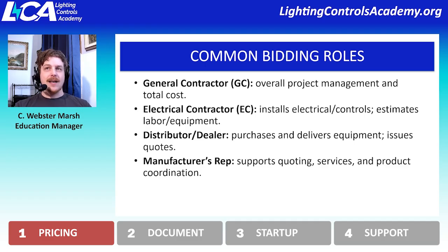Sometimes that's not enough information for the manufacturer's rep to be able to quote. They might ask for actual documentation for the project, and hopefully the distributor can give that. But this is where sometimes there are some challenges with the bidding process, because not everybody has the entire documentation for the project. So making sure that the documentation carries forward can be kind of challenging, and oftentimes there might need to be some back and forth saying, oh, I am not seeing this document, does that exist, can you please check? And so it's not as quick and streamlined as somebody might think.